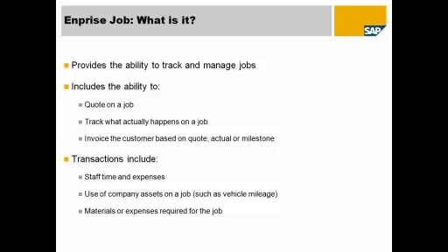So the transactions we're talking about, staff time, expenses, these could also be reimbursable expenses. So perhaps it's a staff member out in the field, maybe a service tech, and they've had to go to a local hardware store to buy something so that they can complete their job. They can enter that against the job, so that's a material used on the job, but also if it's reimbursable, then it will create an AP invoice back in Business One.